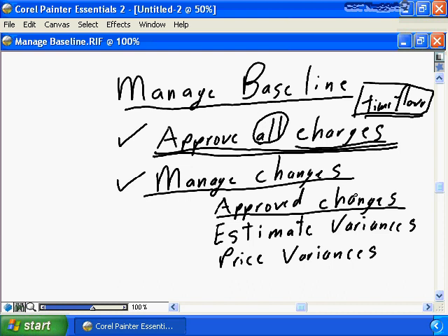When it's an approved change, it is actually a physical change to the project baseline. If through the change management process you have added a change, incremental value to the project of an additional $15,000, the baseline is now $15,000 greater than the original project baseline. Changes, in fact, do change the baseline. If it's an approved change, you change the baseline. You therefore have a different yardstick within which your project is being measured.